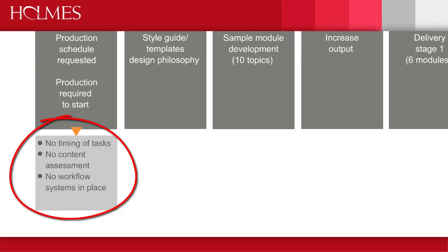Also, we had no prior access to existing content to do an assessment of resources before being required to submit the production schedule. When resources were supplied for the course, they didn't meet expectations. And also the workflow between internal staff and our consultancy took time to put in place. This resulted in some initial communication issues and bottlenecks, particularly in the area of instructional design.